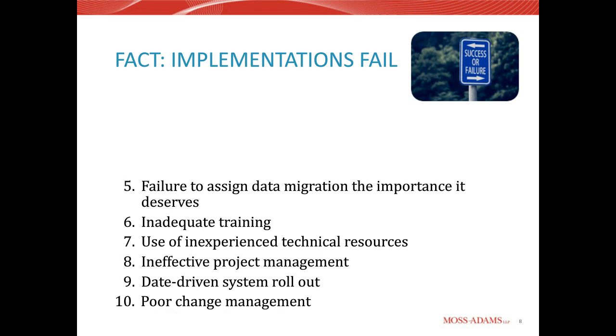Another reason why implementations fail is failure to give data migration the importance it deserves. However well your system is configured, if you cannot get your data in timely and accurately, you have a problem. Before starting your data migration, you need to have a clear data preparation and migration strategy, including a data rollback plan.